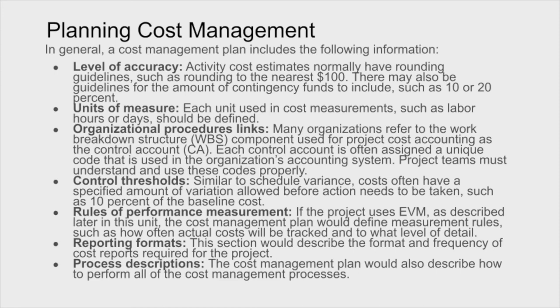We also have rules of performance measurement. So if a project uses an evaluation system called the earned value analysis, and we're going to describe it later on, the cost management plan will define measurement rules, such as how often we actually measure the cost, how we track them, what level of detail is required.